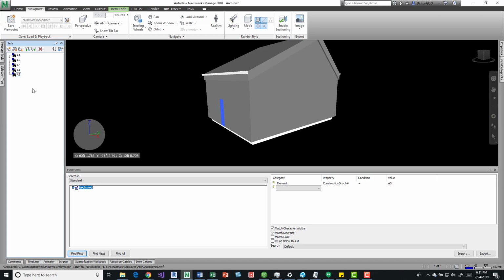Within Revit, the schedulers just need to apply the correct parameters to the walls, to the elements within Revit. And if they miss something, they just have to make sure that they apply the correct one. And then with search sets, it'll automatically search each time it's open. It'll search for every element with the A1. So if we forgot a wall in the first one, we can export out.